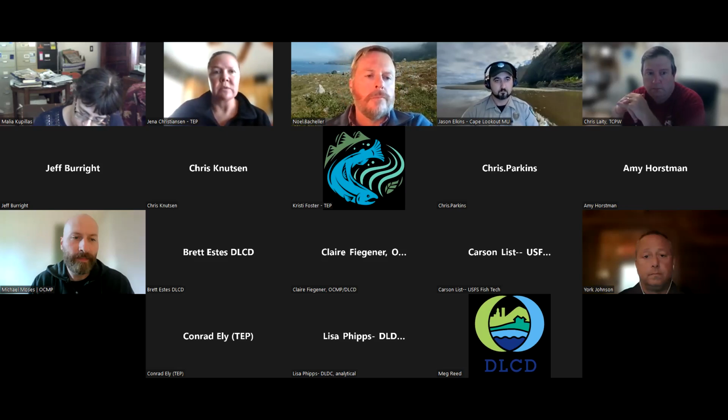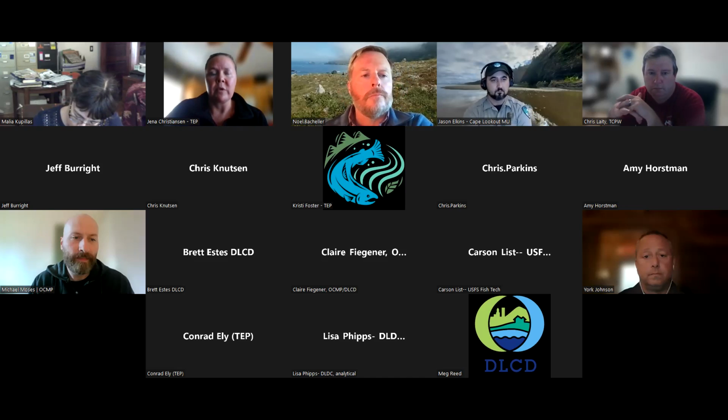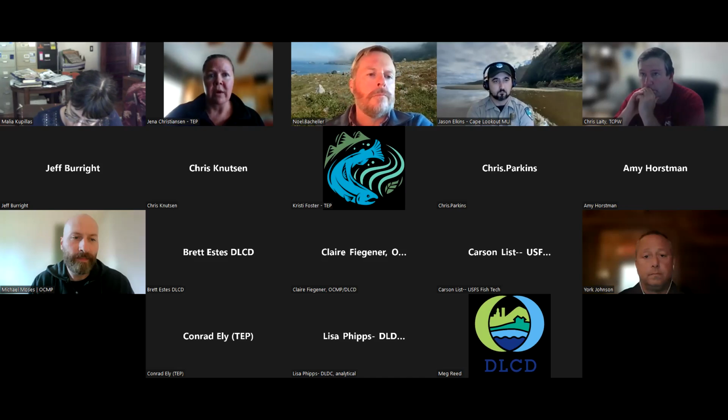So as far as work that's been done at this point, ESA was able to do their drone imaging late September. I believe it was September 26th and 27th. They flew the whole site basically from the south Sand Lake Sandbar all the way over the community of Tierra del Mar for FODAR and LiDAR imaging. And all of that's going to go into their 2D hydrodynamic model that they're building.